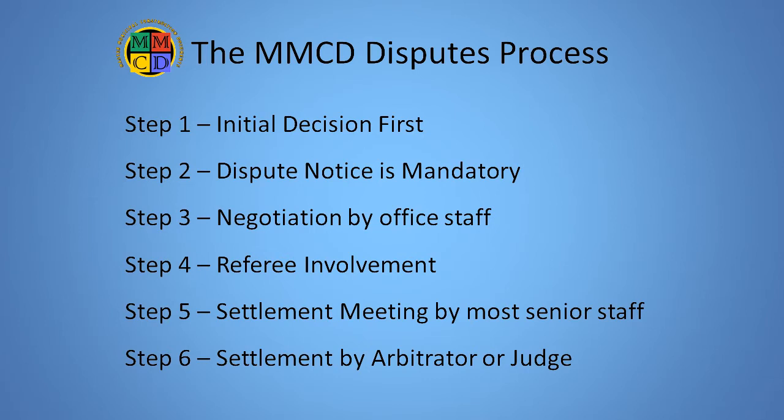Step 3. The next step is to have a negotiating meeting where the next level of staff from both sides meet to decide if the dispute can be resolved quickly.